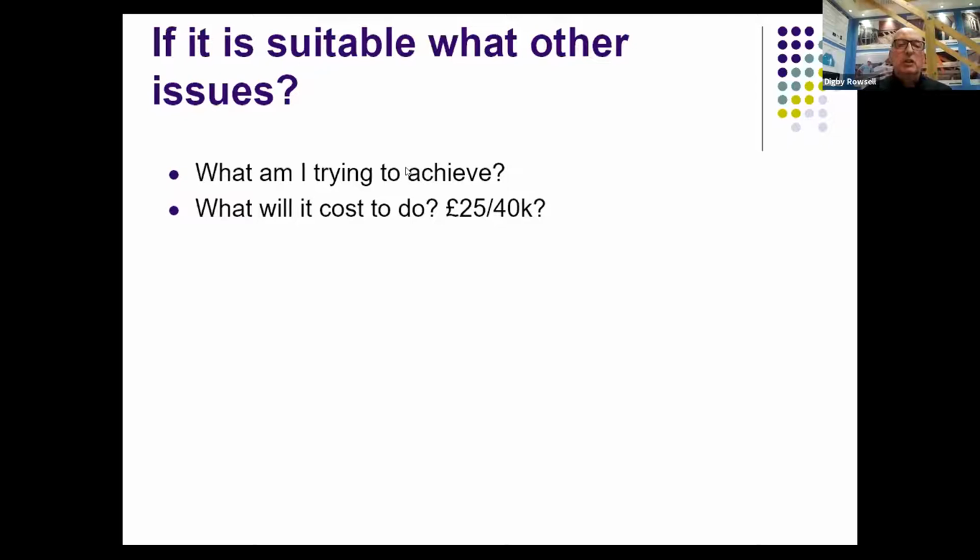The budget costs varies hugely depending on how you're going to carry out the work, whether you're going to do it as a DIY self-build approach, how complex the conversion is, what it involves, how many bedrooms, whether it involves bathrooms. But typically, as a guide, 25 to 40,000 is a common cost of a loft conversion.